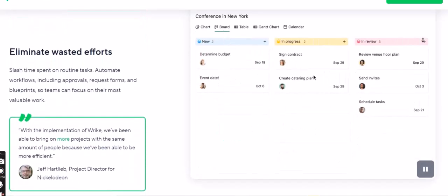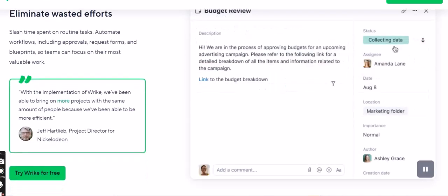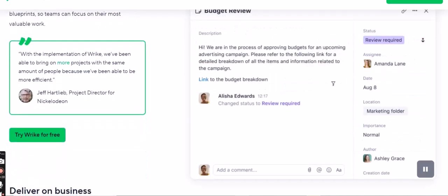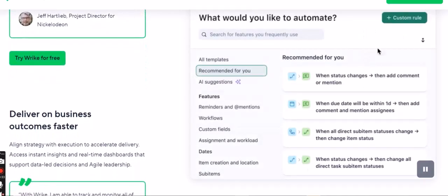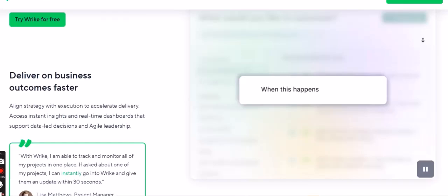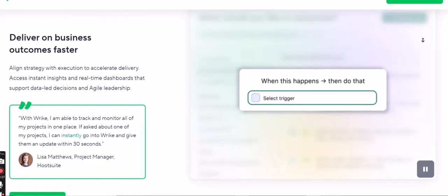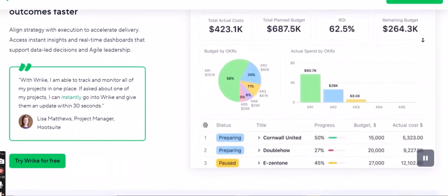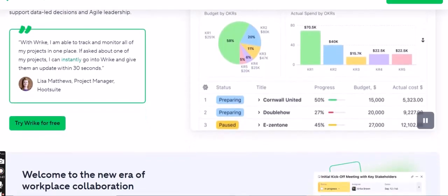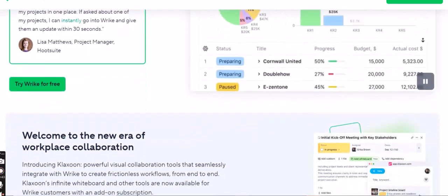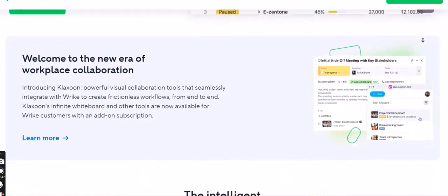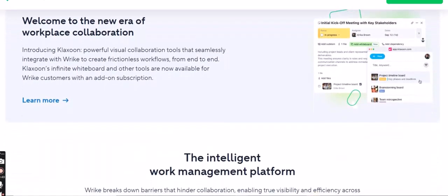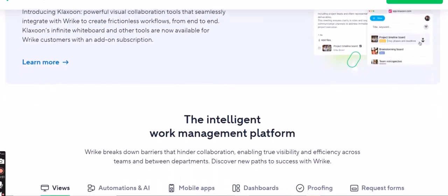Edit. Users with edit access can view and modify tasks, change statuses, and collaborate on the project. However, they might not be able to alter project settings or invite new users. Read-only. Users with read-only access can view all project information, including tasks, timelines, and discussions, but they cannot make any changes. This is suitable for stakeholders who need to stay informed but aren't directly contributing to the work.